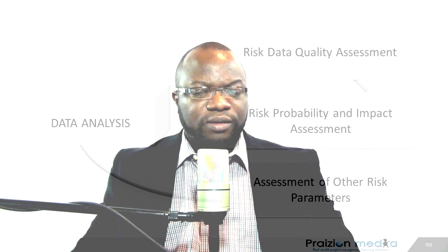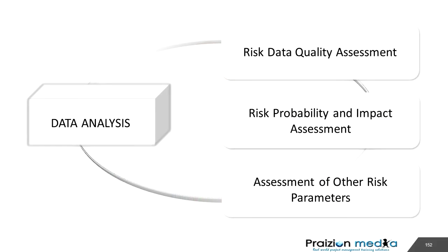But you could also have risks that are 1 in terms of the risk score, or 1 times 1 to give a 1, or 2 times 2 to give a 4. But those risks shouldn't be forgotten. Those risks should be put on a risk watch list. Really, your risk watch list is the lower items in the risk register. Those that fall to the bottom, keep monitoring them. Don't forget them. They could become very toxic and dangerous. So it's important that we keep an eye on those lower level risks because they could become really bad.